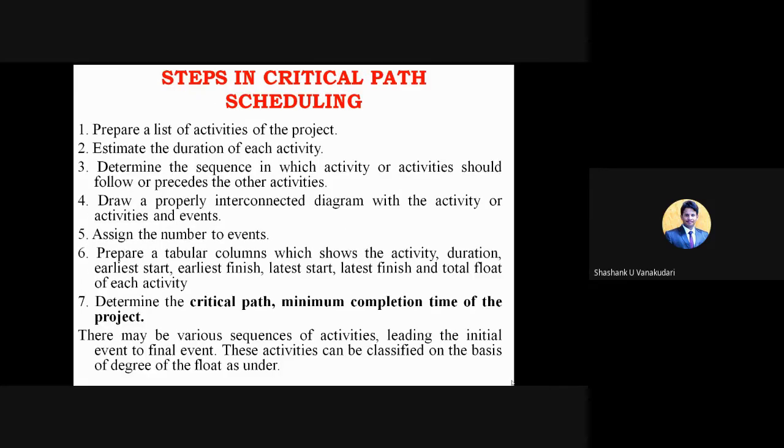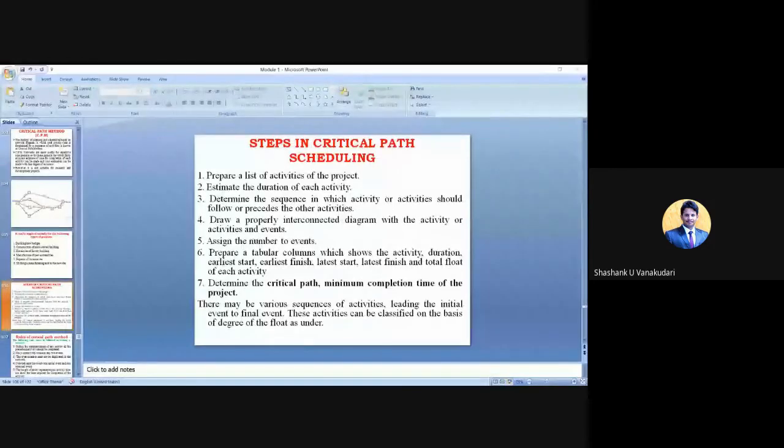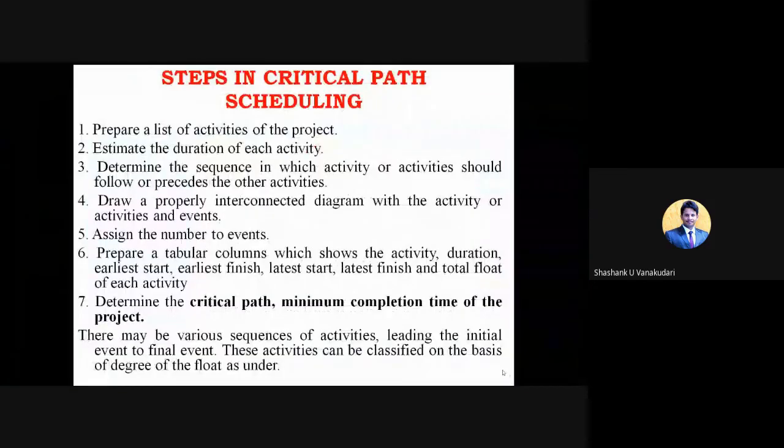And here, which is most important, that is steps in critical path scheduling. Okay, so before starting this critical path scheduling, first we need to note down all those activities, whatever comes in the project work, right? So that is, prepare a list of activities of the project.